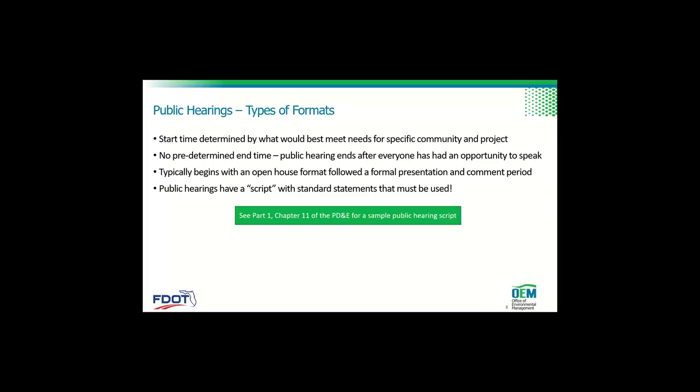Generally, our public hearings start around 5:30 in the pre-COVID world and usually last a couple of hours. They often start with an open house format followed by the formal presentation and the formal comment period. There's no predetermined end time. The public hearing ends when everyone has had an opportunity to comment.